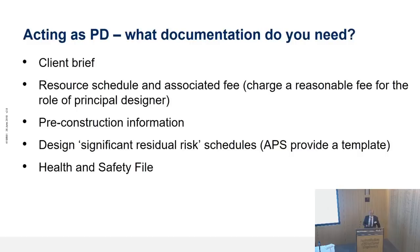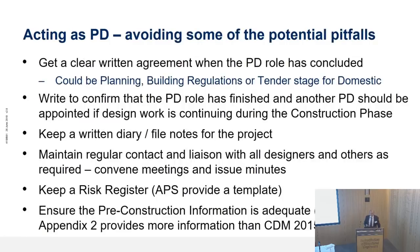The APS — the Association of Project Safety — helpfully provides a free template for the risk schedule. On pitfalls and how to avoid them: get clear agreement about when the role is concluded, because you might not be there for the whole project and you don't want the liability to last that long. Particularly for domestic jobs it could be just at planning, building regs, or tender stage. Write to confirm when the role is finished, but also state that the client needs another principal designer if there's going to be more design work during the construction phase. For all duty holders, I always say: keep a diary, day book, or file notes — it makes life so much easier if something goes wrong that you've got contemporary notes. Maintain regular contact with other designers — that helps get things done and demonstrate that you are ensuring the other designers are doing their duties.